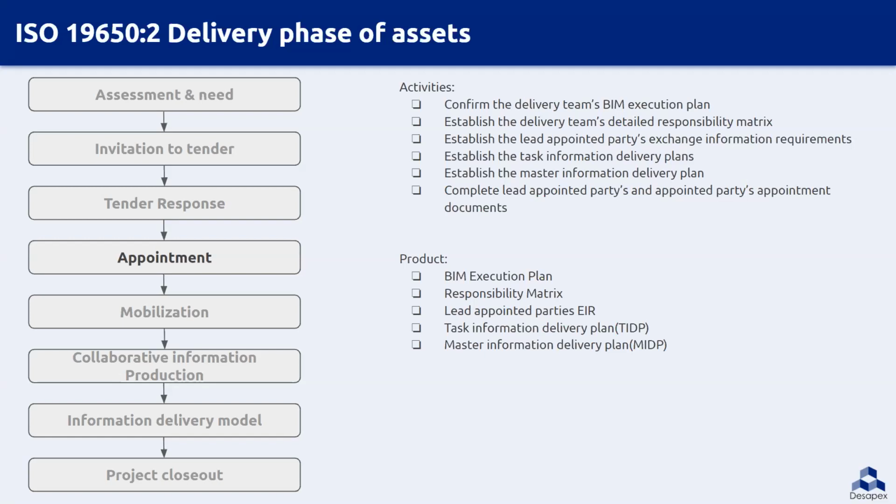Basically, TIDP is a plan which specifies the delivery dates for a specific task team. MIDP is a combination of all the TIDPs from the task teams, so we can consider it as a master schedule. The last part of the appointment will be to complete the lead appointed party's and the appointed party's documents, like confirmation on the TIDP's information protocols and standards. So this will be the last part.